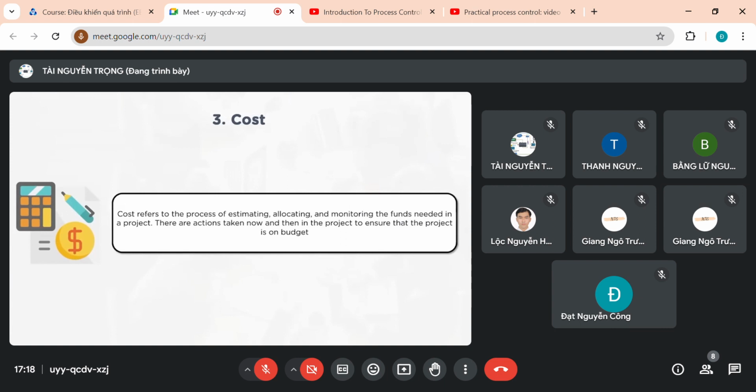So for that there should be a layer of quality management where auditing or control activities are initiated periodically so that any deviations can be seen easily. And remember, a project manager cannot become part of quality management. Like, a project manager cannot audit. The project manager should have a team or take the help of a team who are able to do it. Mostly the one who is not part of the project is always better.